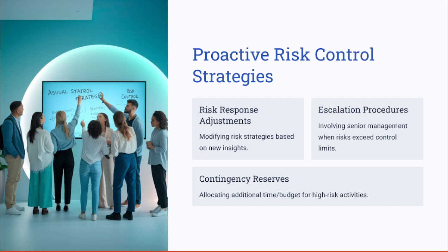Also, one of these risk control strategies is escalation procedures. If you recall, one of these risk responses was to escalate. Escalating is like taking it to the next level where you have no control. By following the escalation procedures, like involving the senior management when these risks exceed the control limits.